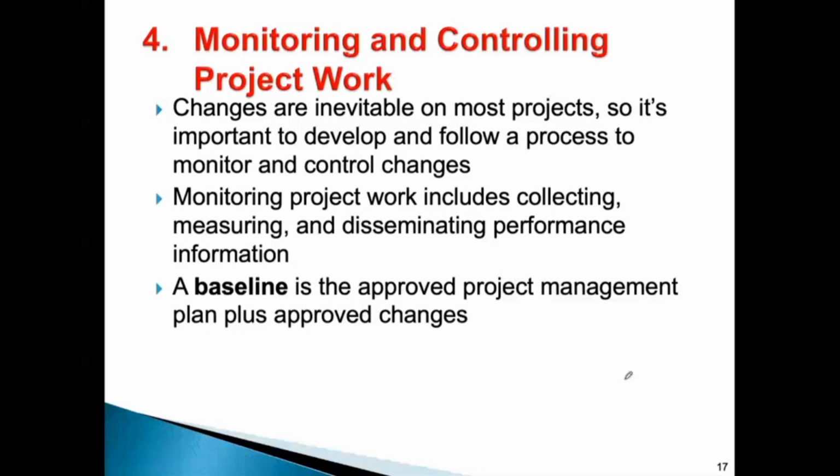So the project management plan, the master plan that I just mentioned earlier, after it gets approved by the sponsor or the project senior managers, will be your baseline. Anything you do in reality has to be compared with this baseline, your plan. Now, if you notice that there is a problem in the plan and you want to modify it, then you need these changes to be approved.